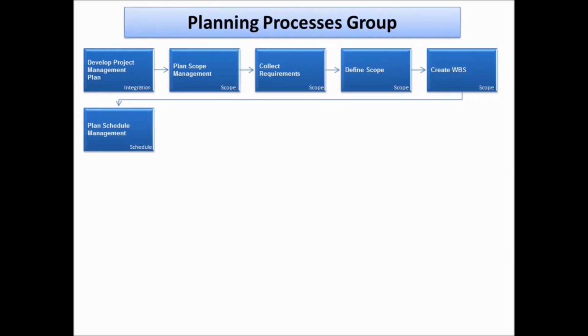Moving on to the next process, which is plan schedule management. So this is where I plan how I will manage my timelines or schedules for the project. For example, what will I do if someone asks or some task gets extended on the timelines? How am I planning to calculate those durations? What are the tools that I will use to calculate those? What is the precision value that I will stick to? How precise do I need to be when I set the activity duration? All these will be defined in the plan schedule management.